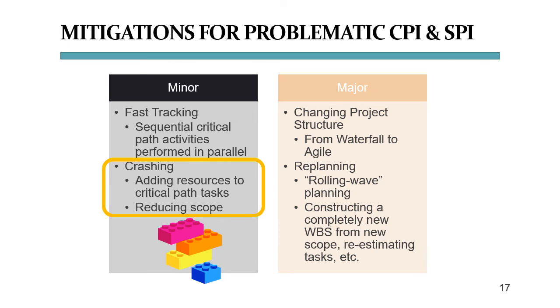The second option is to reduce project requirements or scope through the project change request process. This option will not increase the cost to your project, but some of the contracted scope may fall victim to the financial axe. This will only work if the project sponsor and all the major stakeholders approve, and you will have to determine where and when the scope that you cannot deliver now will get built eventually.